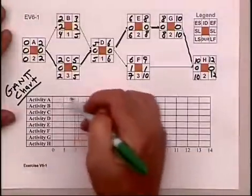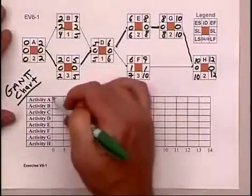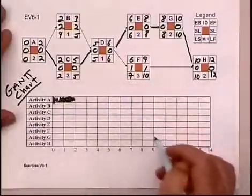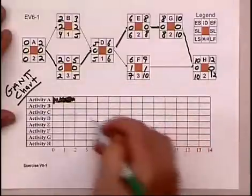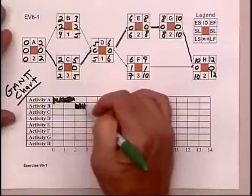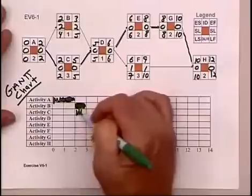We look up here and see activity A is the first activity. It starts at zero and has a duration of two, so we mark it in. Then B can start, which has a duration of one, and C can start. Notice how the bars are representing the time frame given this timeline.